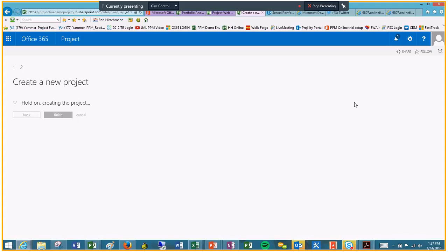So what it's doing, it's actually initiating the project request. It's actually going to potentially apply a workflow based off of a project type. It may take a project schedule template that will help you do your basis of estimate and put that in here, as well as it may actually create a SharePoint site for this specific type of project as well. So this whole process can all be automated, your intake and your request management process within your PPM toolset. In this case, we're using Project Online to do this initiation.